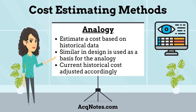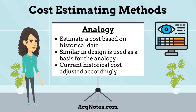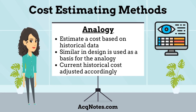The second method commonly used is analogy cost estimating. The analogy method is used to estimate a cost based on historical data for an analogous system or subsystem. In this method, a currently fielded system, similar in design and operation to the proposed system, is used as a basis for the analogy. The cost of the proposed system is then estimated by adjusting the historical cost of the current system to account for differences between the proposed and current system.